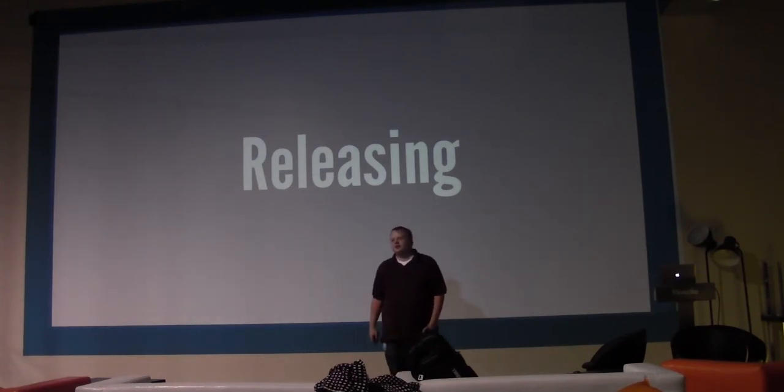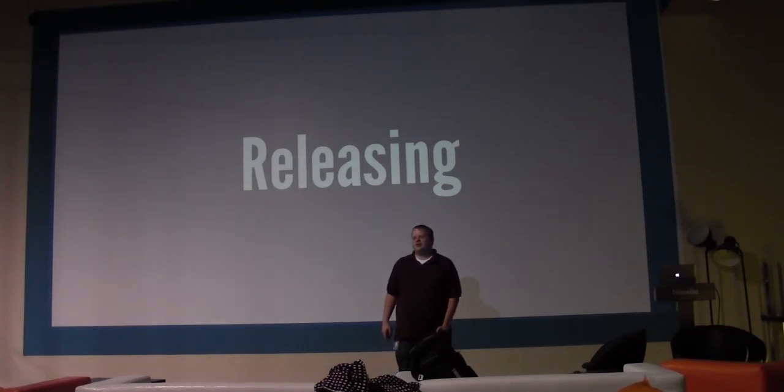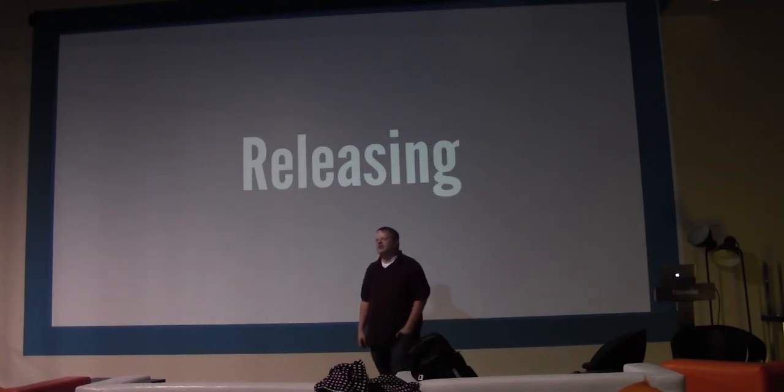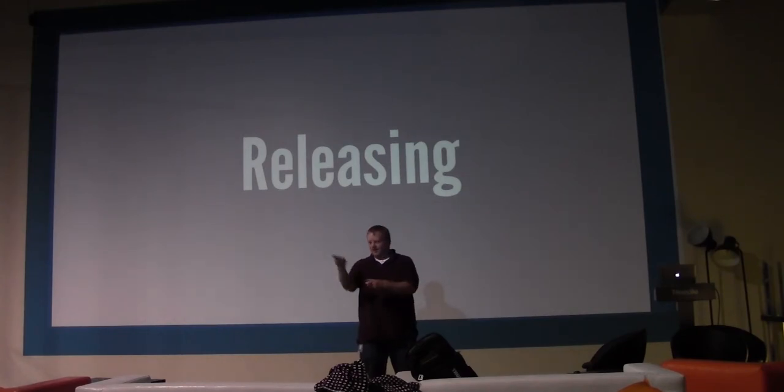Where you say, oh, I worked on this for 4 hours today and I have 6 more hours. So we do sizing. We estimate not on how many hours we think it's going to be, but more on complexity, saying this story is more complex than this. For us, the average task that takes a couple hours is about a 2 in our scale. We use a Fibonacci scale. Something that's really fast is a 1, something that takes even more than that is a 3, but a really good project is a 5.